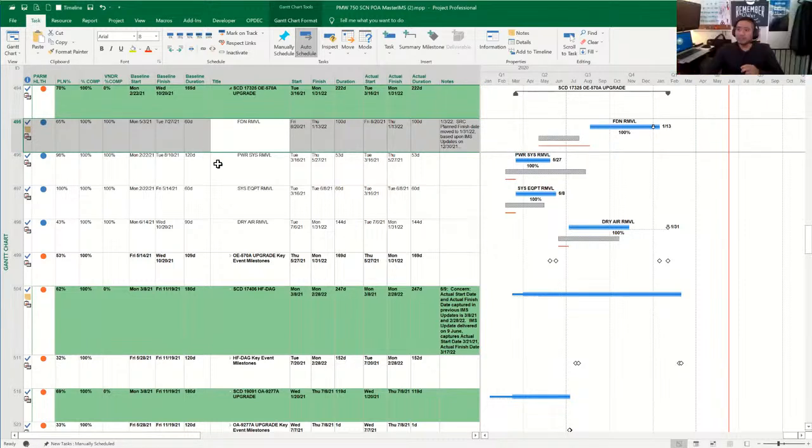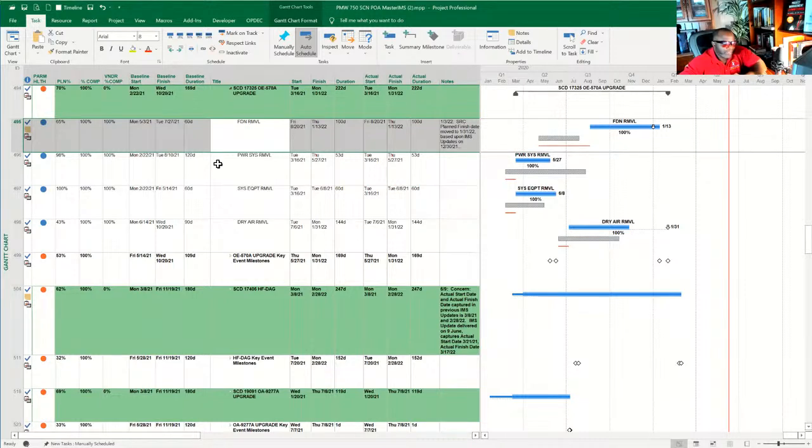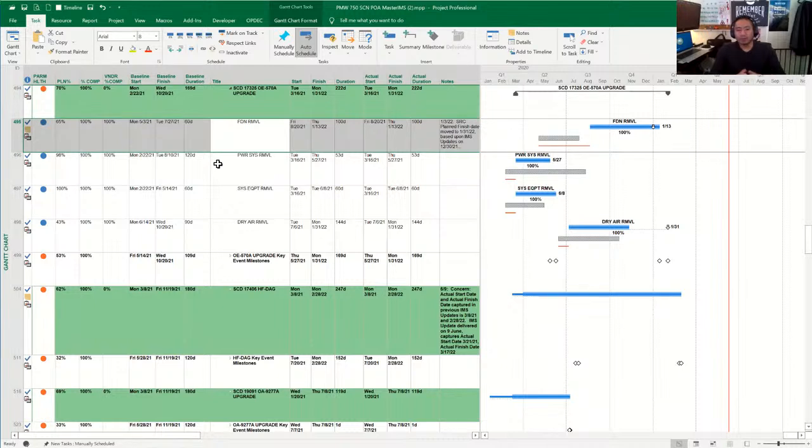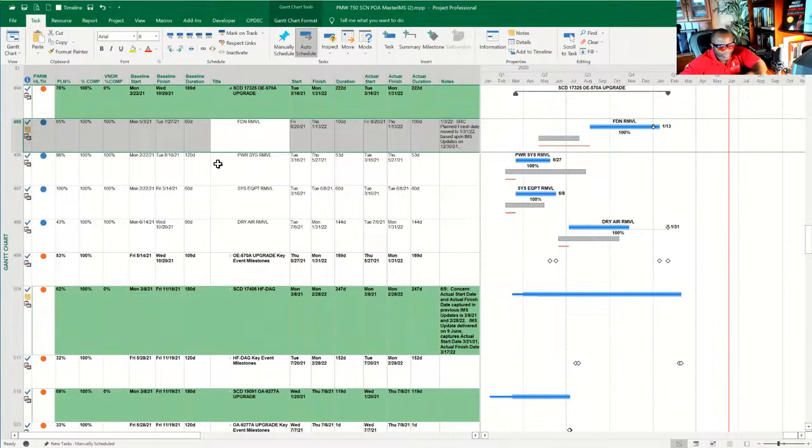I mean, if one uses constraints such as must finish on, must start on, even though it doesn't have to be that way completely, you're just going to create artificial constraints in the schedule. Correct. And there are different types of constraints, as you mentioned in your sessions. I think it was the hard constraints and the soft constraints. But yeah, the MSO, the finish no later than. So which ones are the worst? The bad offenders are the hard constraints.